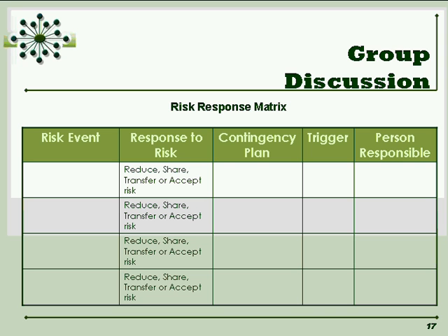It's after the protocol is approved and after the MOP is complete or generally complete, it's a really good time to do this. One of the things that we typically try to do is about 6 months after starting to use the instruments and to do the protocol, we step back and take a look at our procedures, our preliminary procedures, and just see what we need to change or tweak, what worked, what didn't.